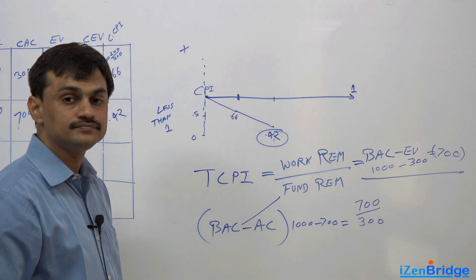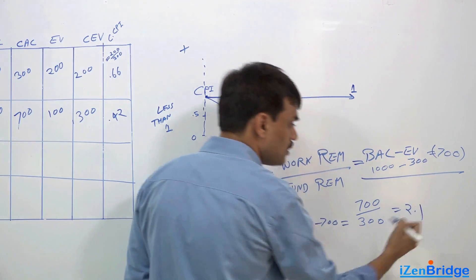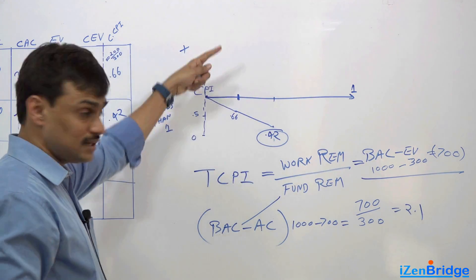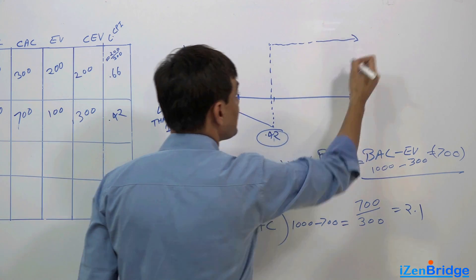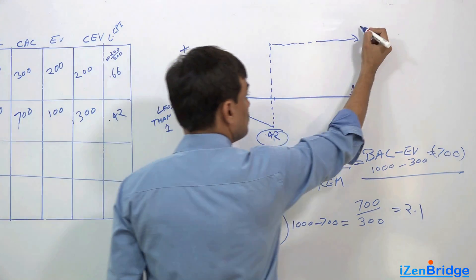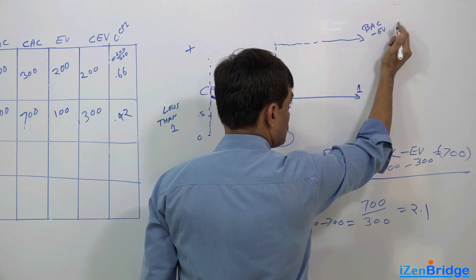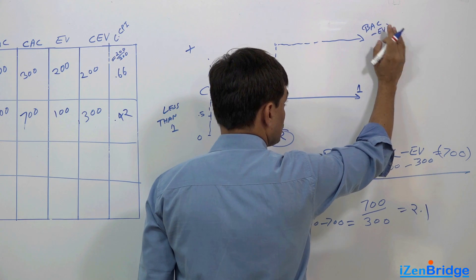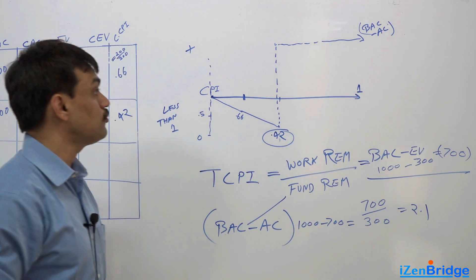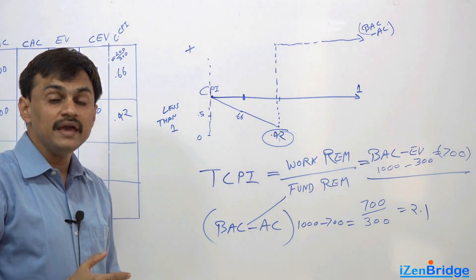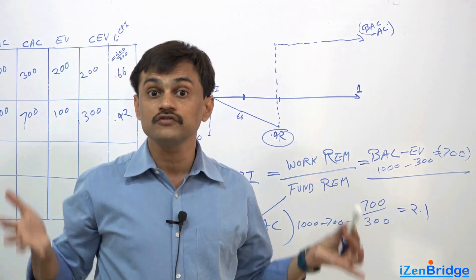And if I go with this calculation, it is $1000 minus $700, and I am reaching to a situation where I have $700 divided by $300 to take care of. So I need to achieve a cost performance index of 2.33. So if I want to get this work done, I need to take my performance somewhere here, and then only I can finish the work. I need to make $2 from each dollar spent because I'm only left with $300 and I need to finish the work of $700.